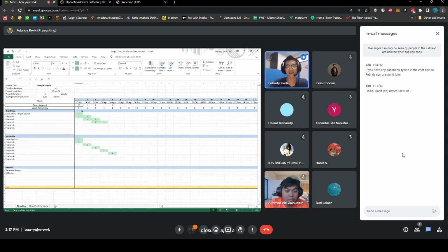But then you said, okay, I'm just gonna be involved every other week. If you're involved every other week, that way you calculate your cost. This way you're part time, like you're giving half a week every week, right? For this project only, because eventually for project managers you're gonna be doing multiple projects at the same time, right? So you're gonna have to split your cost for that. But for a full time team that works only on this project, you can just put their initials there.